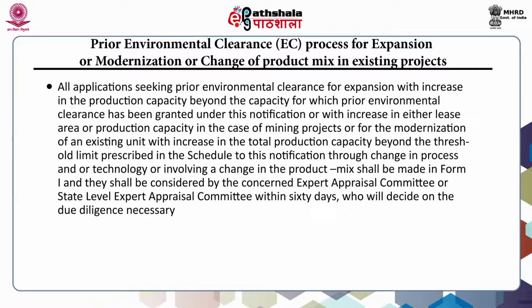They shall be considered by the concerned expert appraisal committee or state level expert appraisal committee within 60 days, who will decide on the due diligence necessary, including preparation of EIA and public consultations, and the application shall be appraised accordingly for grant of environmental clearance.